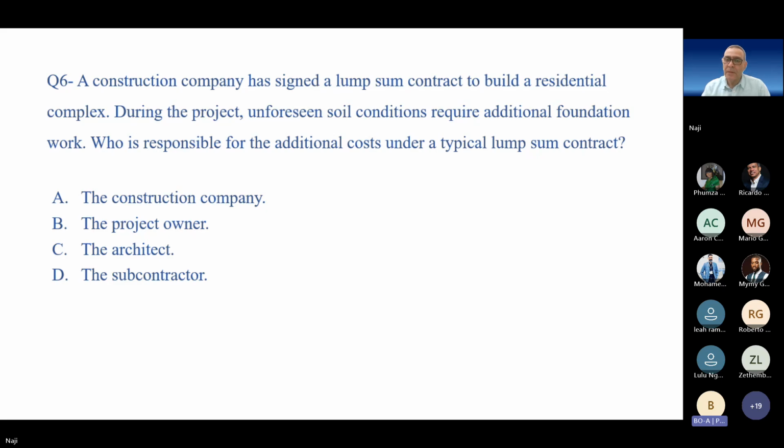It could be anything, but the contractor would not have known. Why would the contractor be paying for that thing that nobody, even the engineers, architect, could not have even known about? And the choice of site is not the contractor's, but the owner's. Would it be the construction company that needs to pay for it, really?